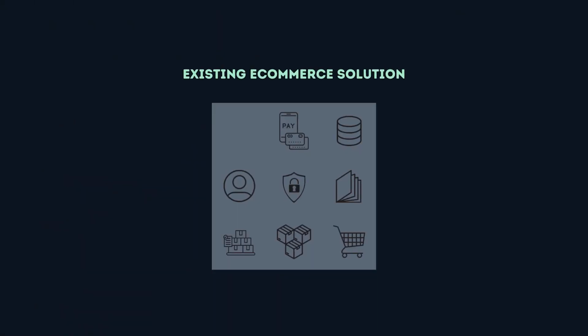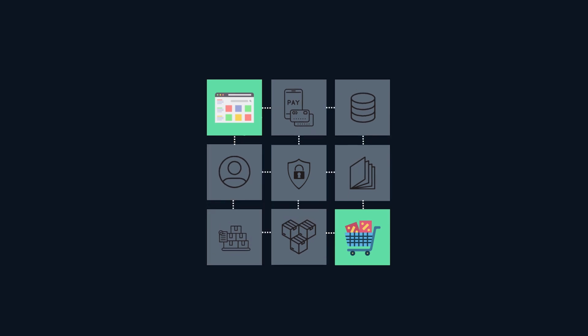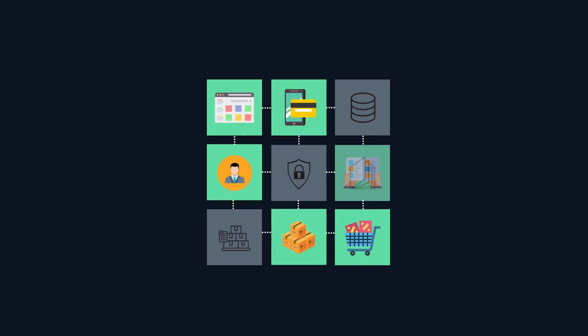For example, if the website is being slow or crashes during large campaigns, we should start by replacing high traffic pages, removing load from the existing older system. Or if the current payment processor has high fees, beginning with checkout may be the best approach. Since we are breaking the project up into smaller pieces that will be deployed and delivered over time, we can adjust the order to create functionality wins or cost savings earlier in the project.